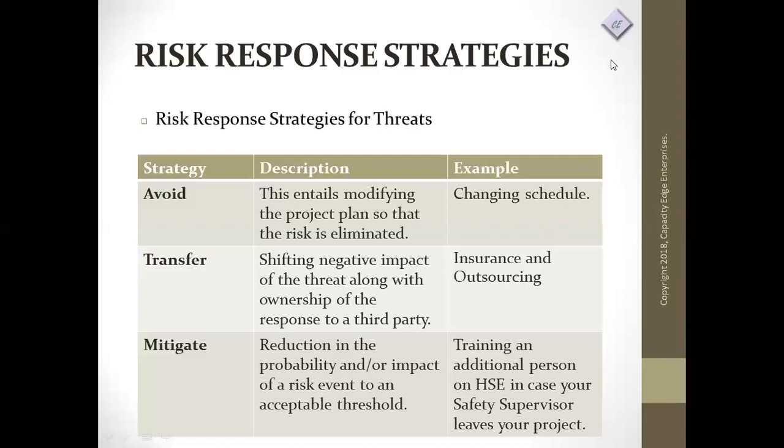Then, unfortunately, not all threats can be avoided. So we have two other options. Transfer. Transfer simply means we want to transfer the risk to another party. So strategies used under transfer include insurance and outsourcing.